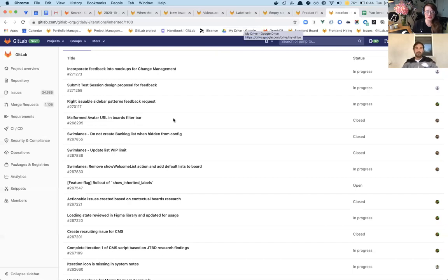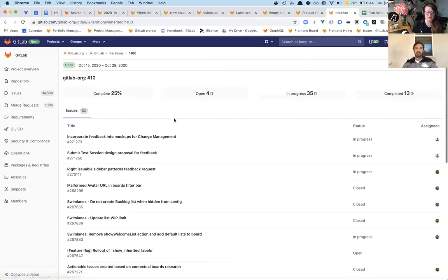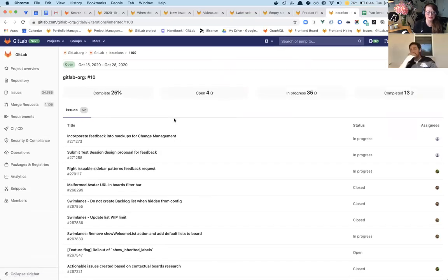Okay, what analytics are you pulling from Sisense? What is the main insight you're looking for there? So I want to see, and that's what the burn up and burn down charts will show, even just a basic burn down chart, so I can come in halfway through an iteration and see if we're on track to complete everything within that iteration, or how much we have left. That'd be super helpful. Also stuff like seeing what our velocity is for an iteration.